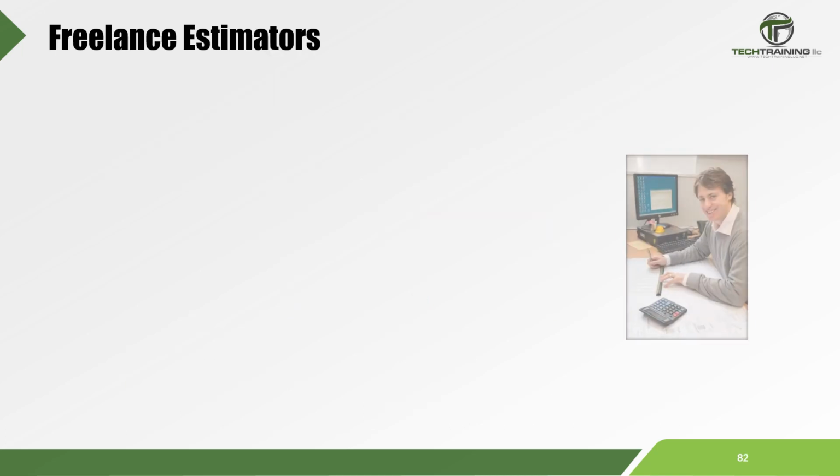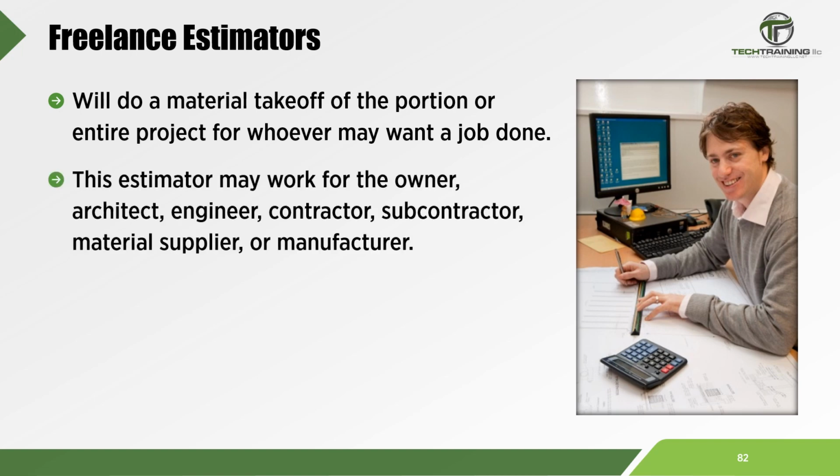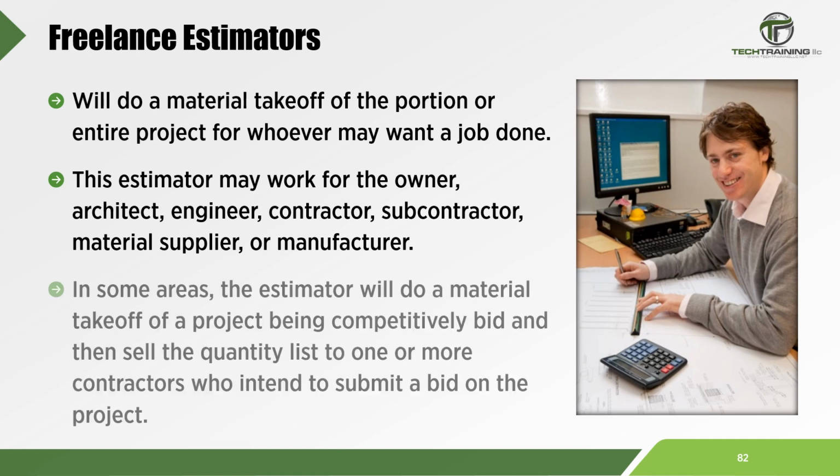Finally, there are also freelance estimators who will do material takeoffs on a portion of a project or the entire project for whoever may wish to hire them. These estimators may work for owners, architects, engineers, contractors, subcontractors, material suppliers, or manufacturers. In some areas, the estimator will do a material takeoff of a project being competitively bid, and then sell the quantity list to one or more contractors who intend to submit a bid on the project.